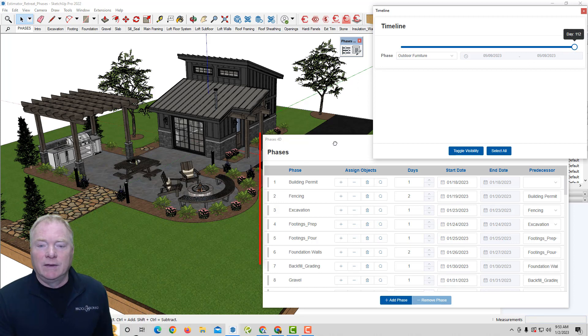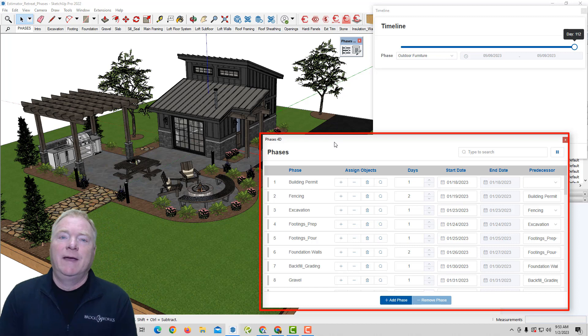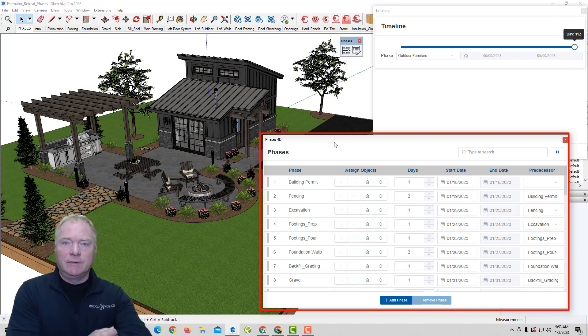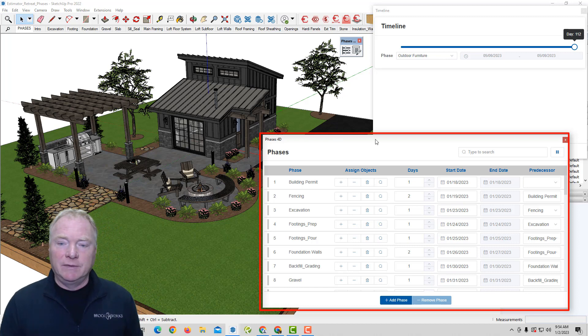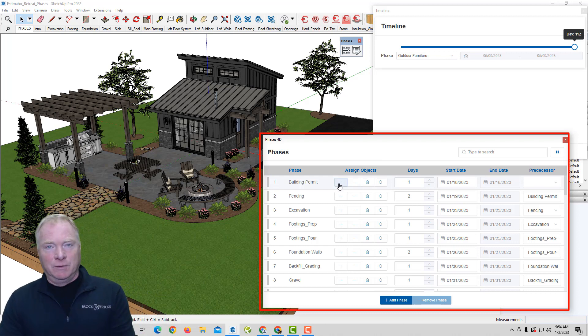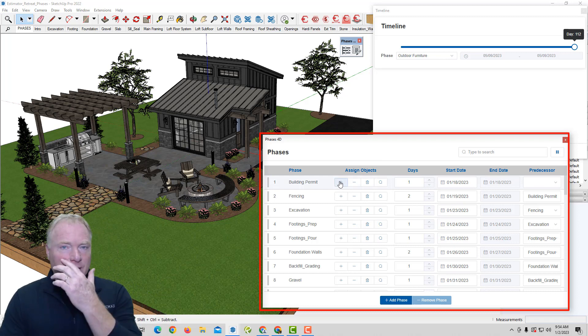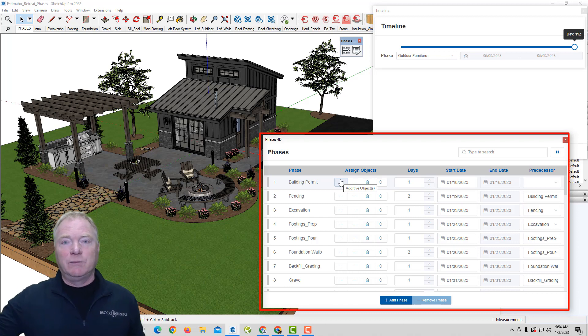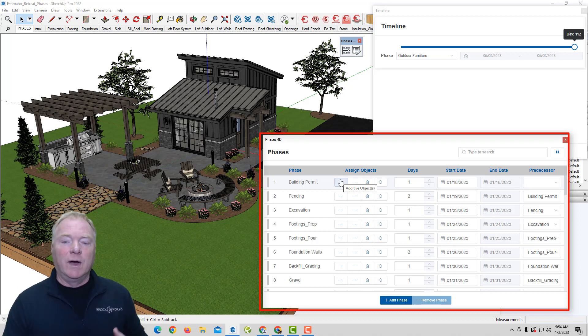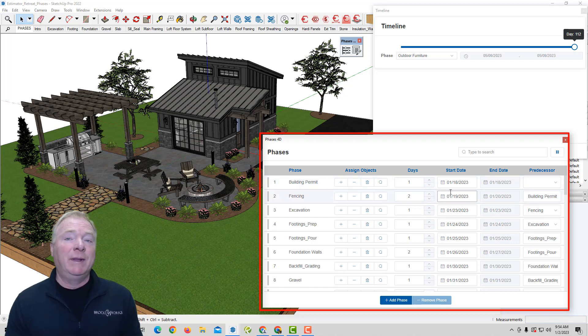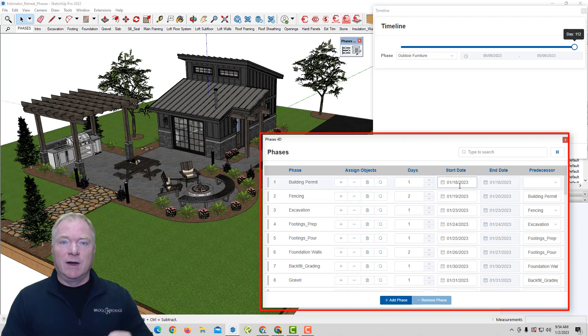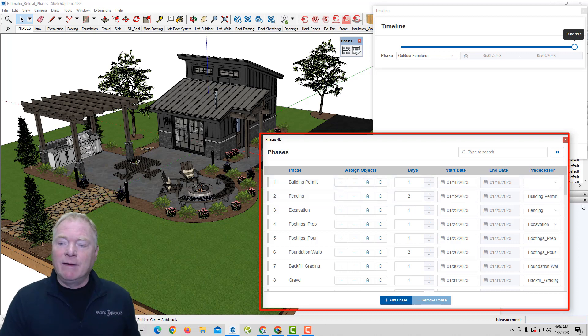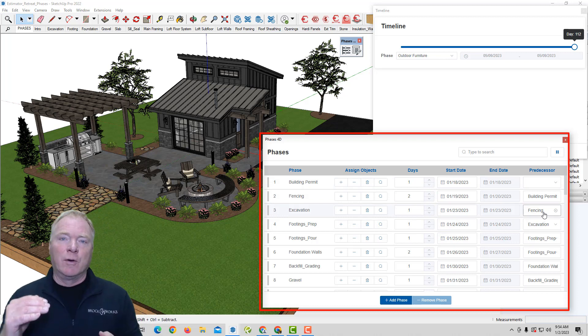So what it looks like in terms of, these are our phases that we create. So in this interface, you can create the various phases. You can assign objects to those phases. Either additive or subtractive. So you could say, if it's a demo job, you want to subtract a portion of it. But otherwise, you're adding these, assigning an object to a phase, given how many days, the duration of the task at hand. First thing we started out was the start date of the project. After that, your predecessors determine the start dates.